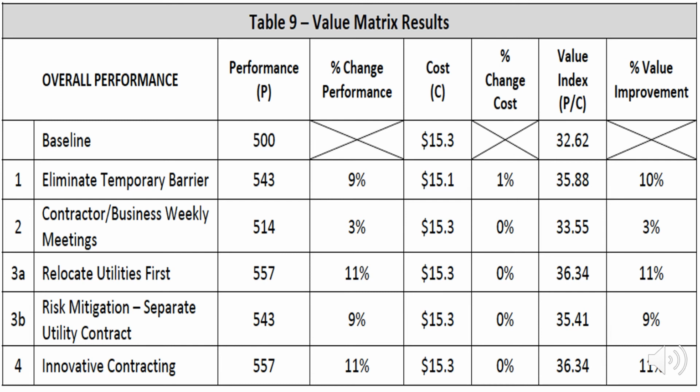Now, in a simple cost comparison, option 1 would be rated higher, but in value, which takes into account performance, which takes into account worth and satisfaction, percent value improvement is higher with the more expensive option. Because, again, worth, importance, satisfaction of needs, those are all accounted for in value.